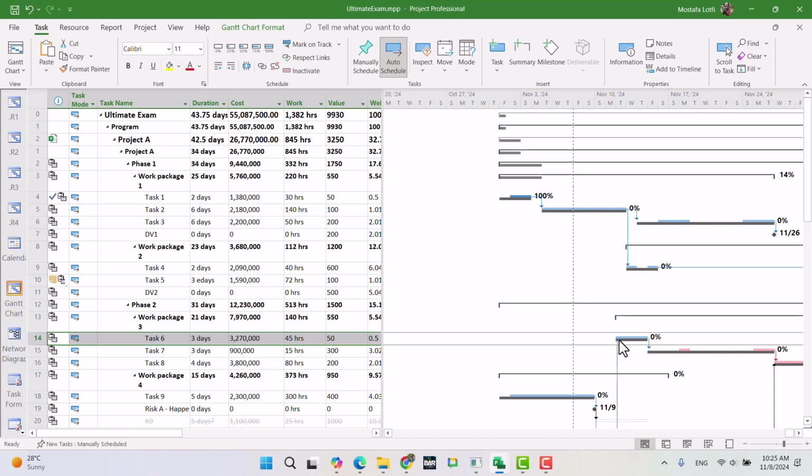And when you finish, when you complete the process of updating the information in your project plan, your project schedule plan should be representative of the status of the project. If it's not aligned with the current status of the project, something is wrong. Either planning was wrong, or updating was wrong, or both together wrong.